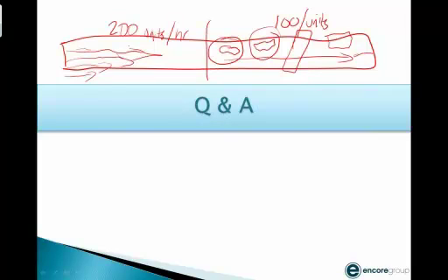we were getting 200 units, right? And the reason the measured mile is so important, if I have a project and I say, well, I only got 100 units of productivity per hour on this job, and we always get 200 units per hour, well, as an owner, I'm going to come back to the contractor and say, well, you don't always have this management crew, and you don't always have this crappy equipment that was breaking down every day out on our job, right? Well, the measured mile analysis looks at it from a specific job.